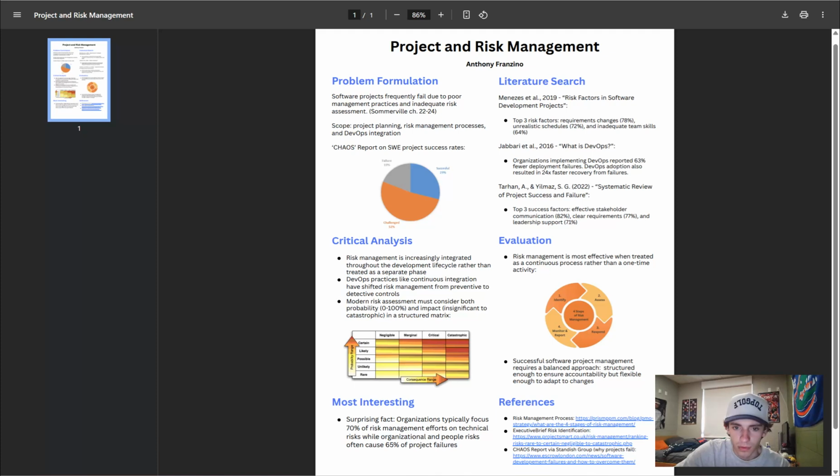So the most effective way to assess risks in modern projects is this matrix format where you rank the risks in terms of how likely they are to happen and how big of a problem it would be if they were to happen. That helps you set certain risks as priorities to look out for. It's also important that you integrate these risk management plans throughout the project, not just at one time, like afterwards. It's important to maintain it throughout the entire process of development.